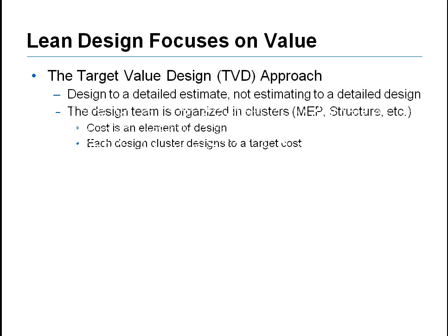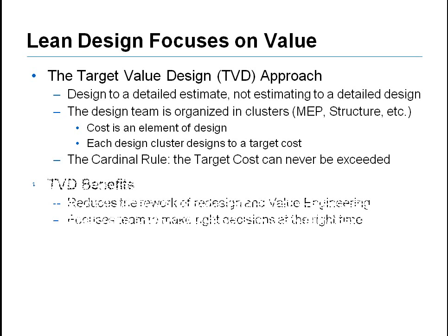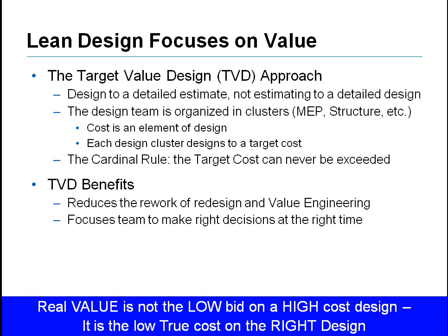In an IPD environment, design cluster leaders include cost as an element of design and weigh those good, better, best options together to optimize the overall design within the project budget. The overarching rule is the target cost or budget cannot be exceeded. The benefits to target value design are reduced rework late in design and minimal value engineering or cost amputation exercises that strip value out of the project. Again, real value is not the low bid on a high-cost design, it is the low true cost on the right design.